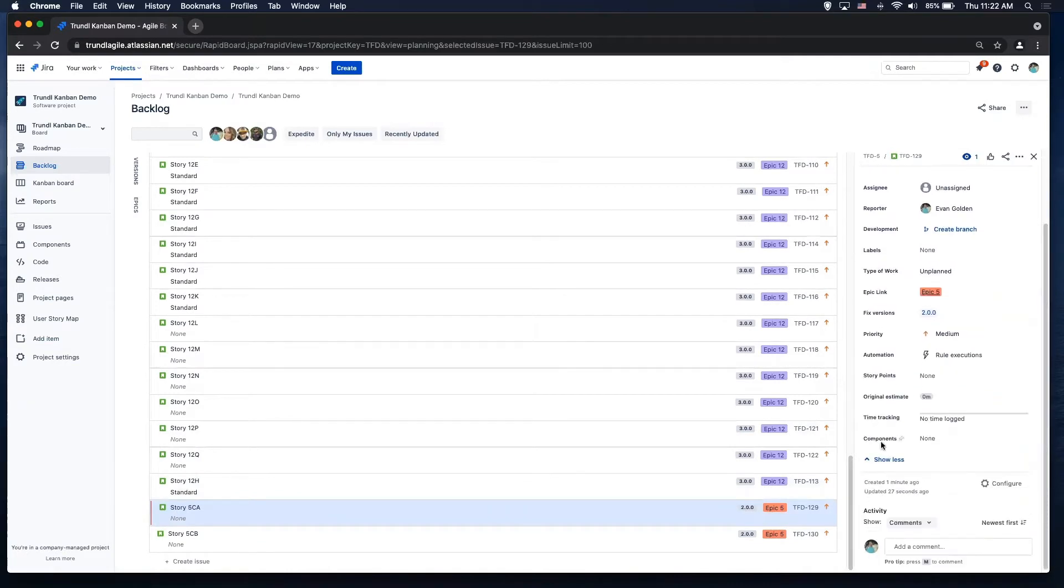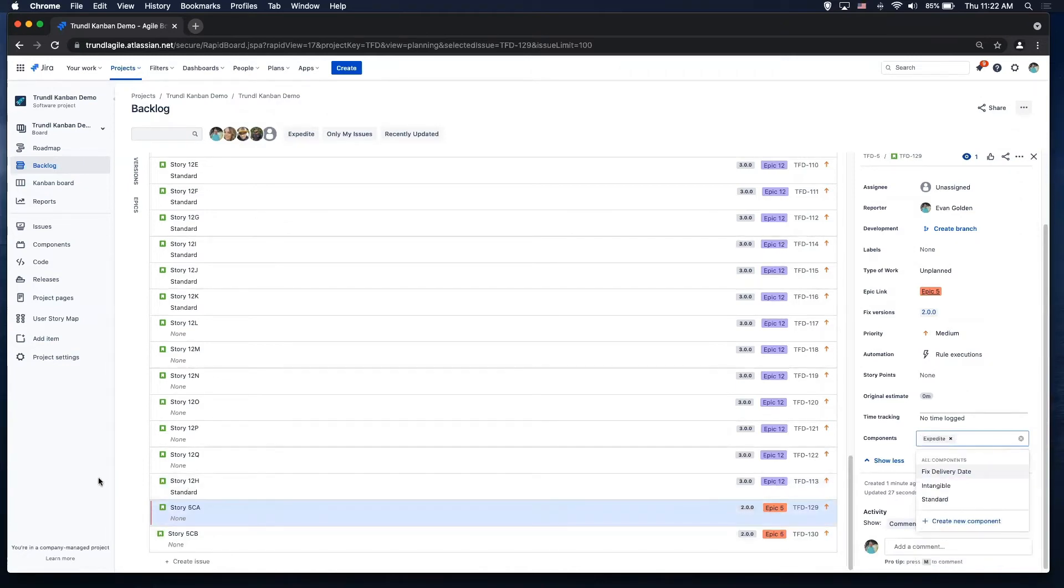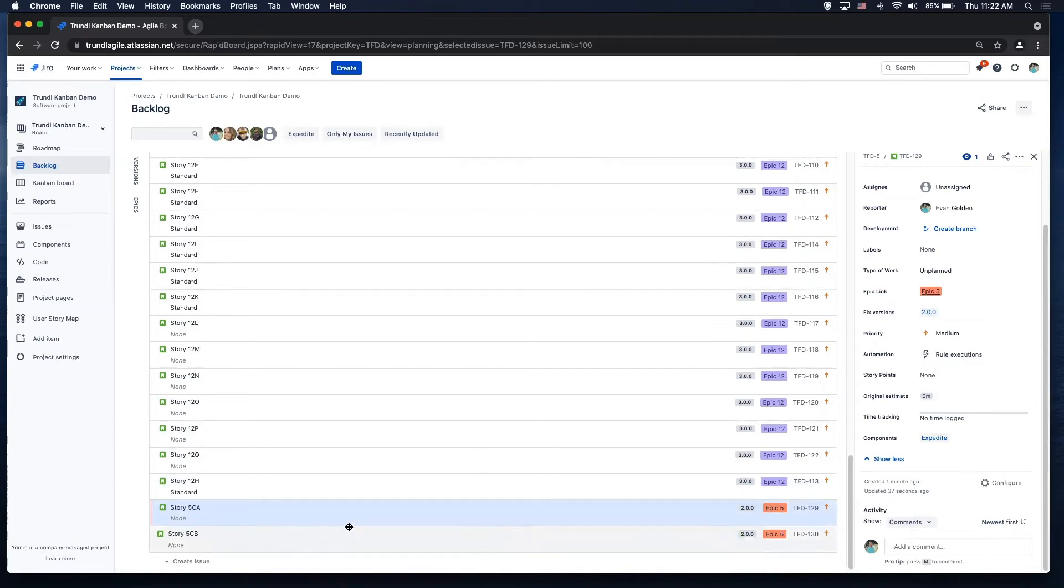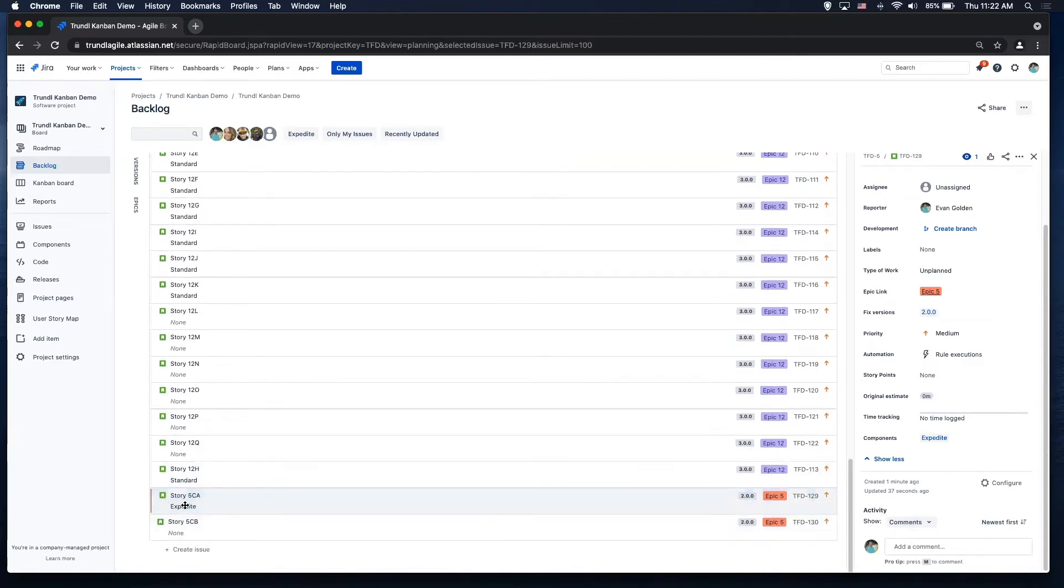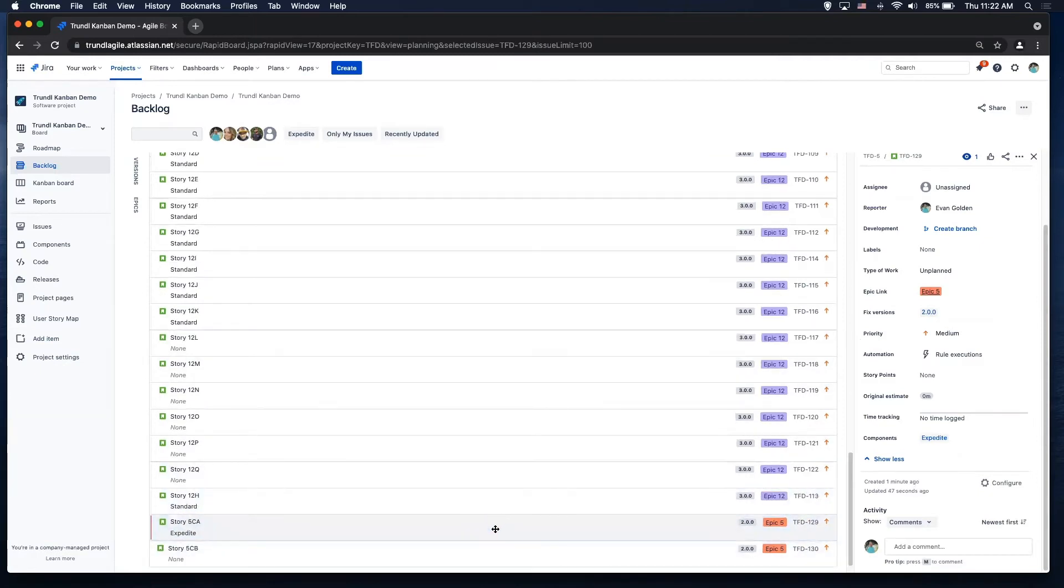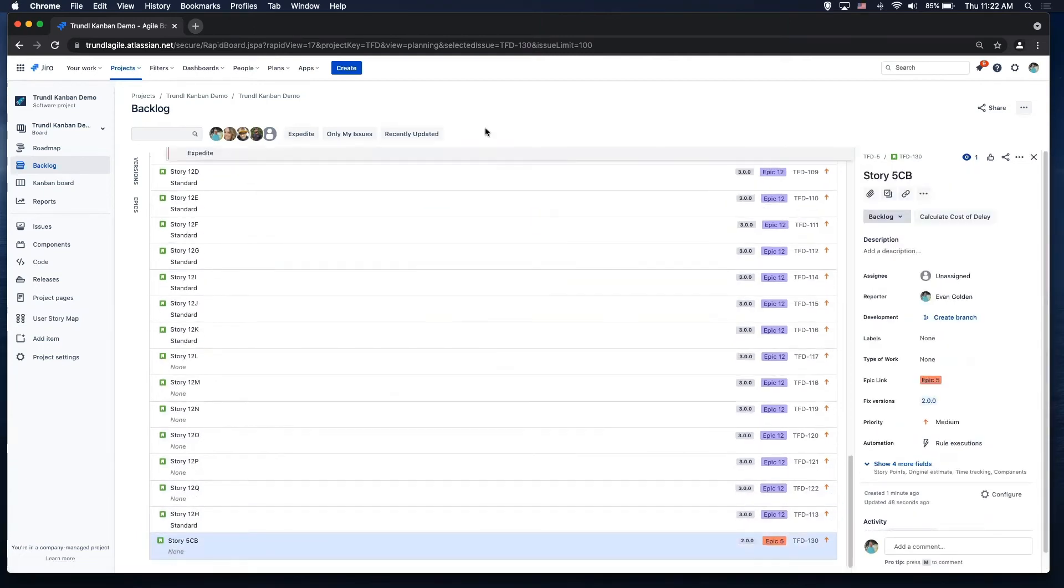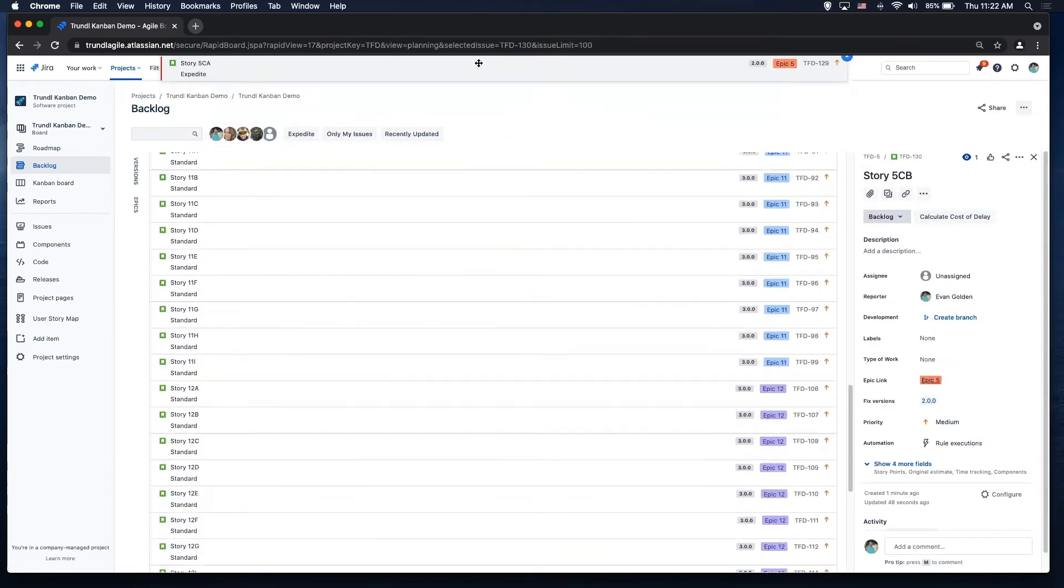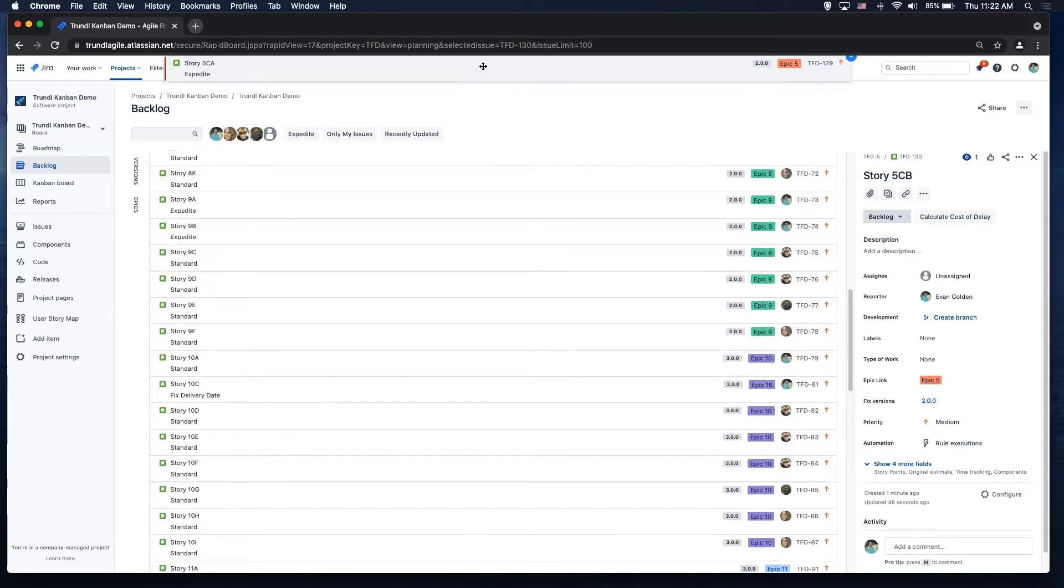I'm using the component fields, but I could use a custom field for my cost to serve my class of service. So I'm going to say this one's expedite and I'm going to add that there. And you'll see that I added a configuration here to show the class of service on the backlog view as well. And then I'm going to go ahead and grab these and bring them to the next status of my workflow, which is selected for development.